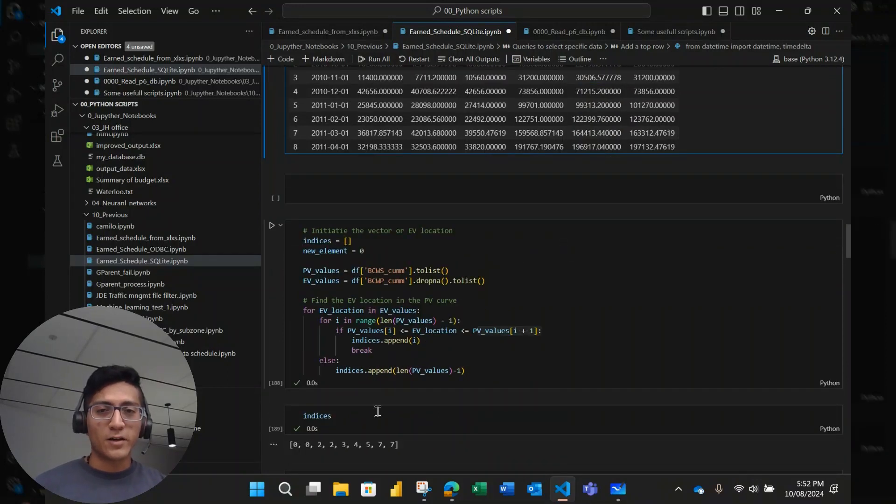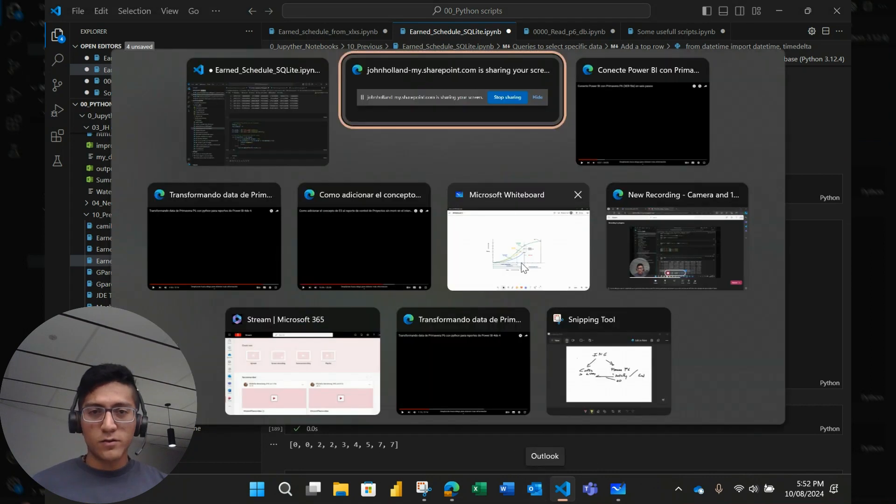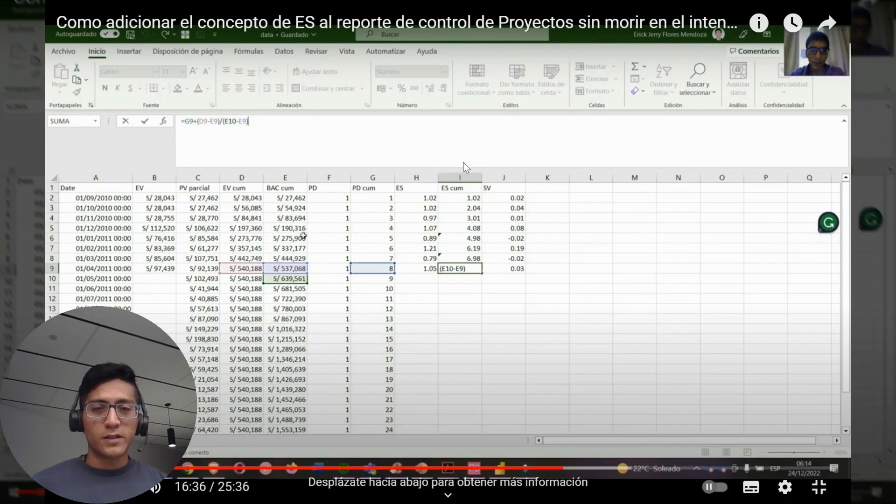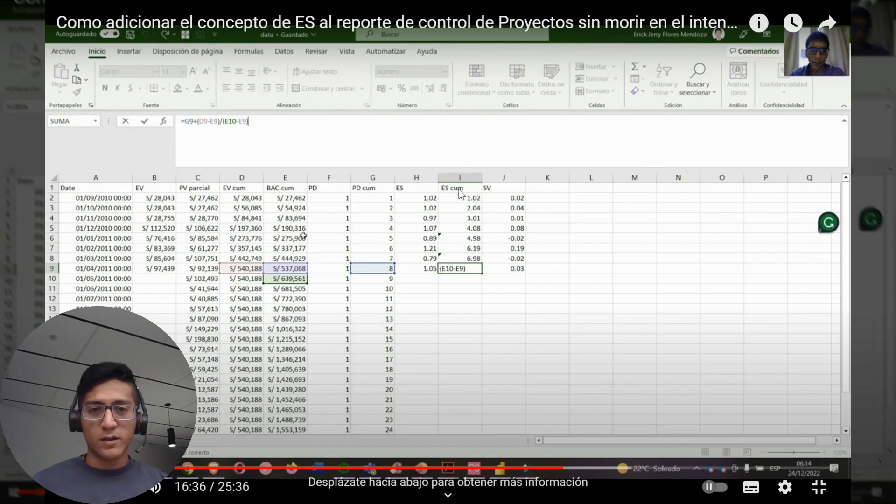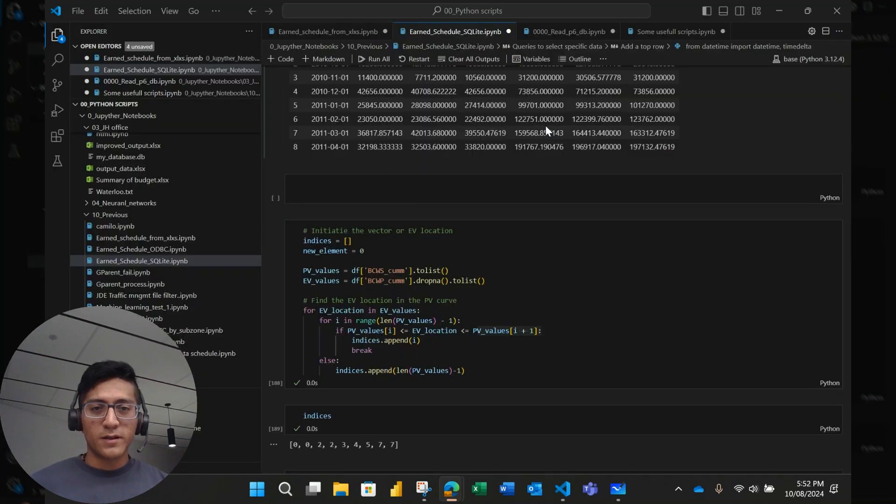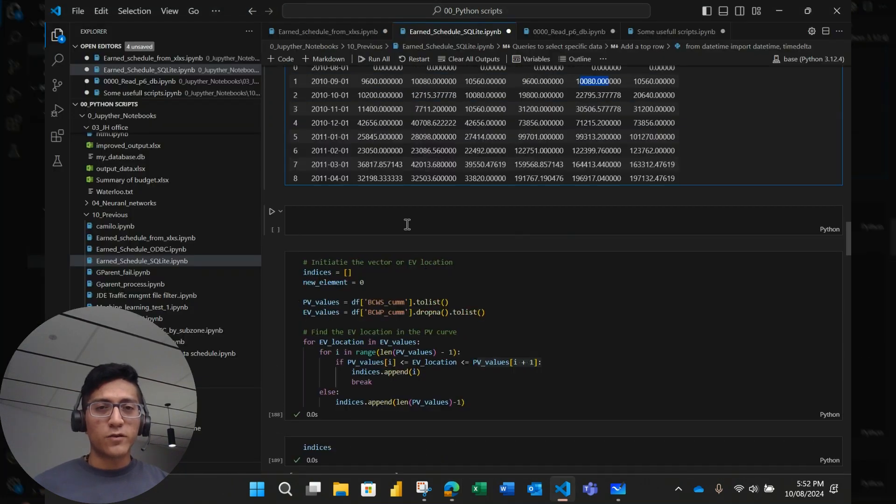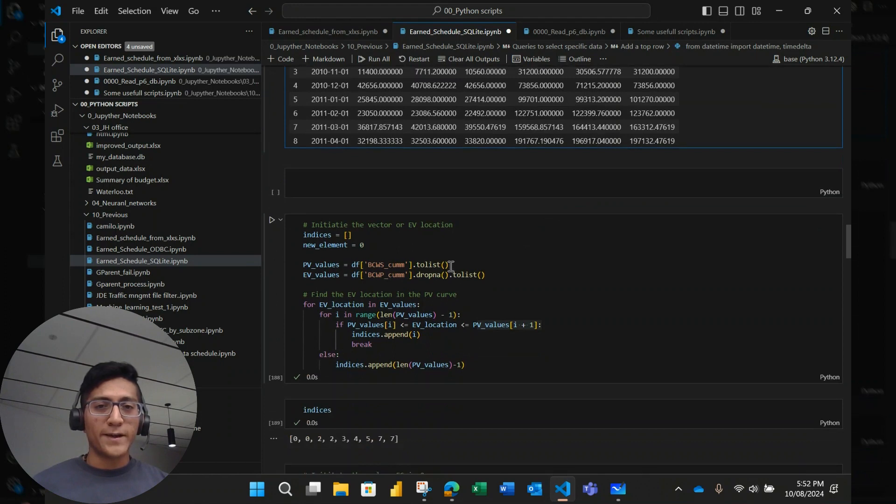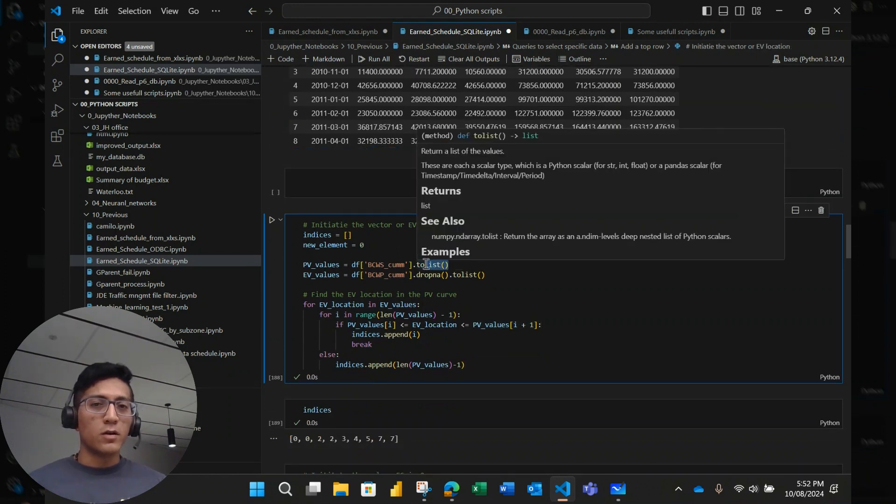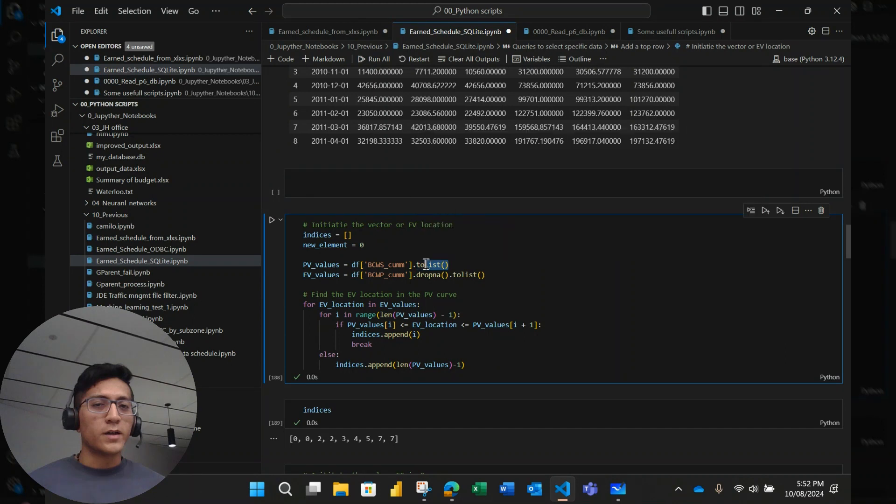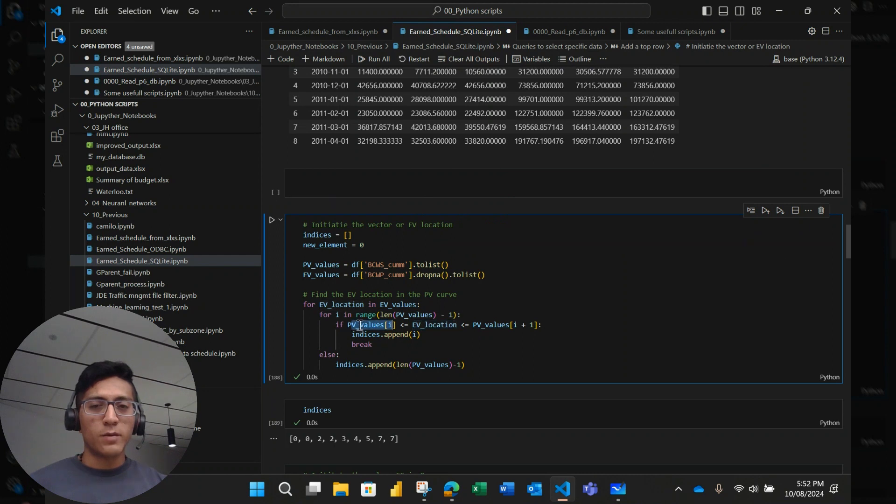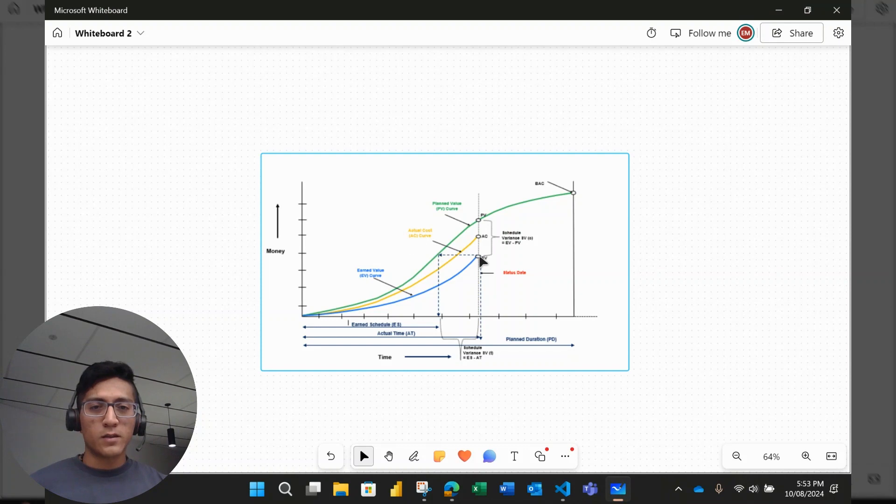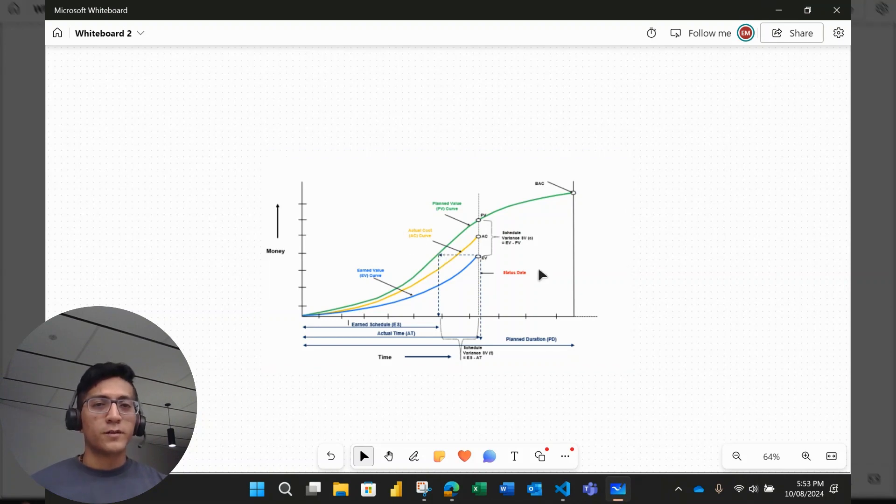So here is the automation, the automated part. As I showed you here, this was a manual process, the earned schedule calculation. So here what I'm doing, it's transforming this earned value and this planned value into a list. And then I'm going to go element by element to find out which are the lowest and upper planned value where the earned value belongs. So I'm going to, for each earned value, look for a lower planned value and an upper planned value. So I'm doing this horizontal projection in that goal.